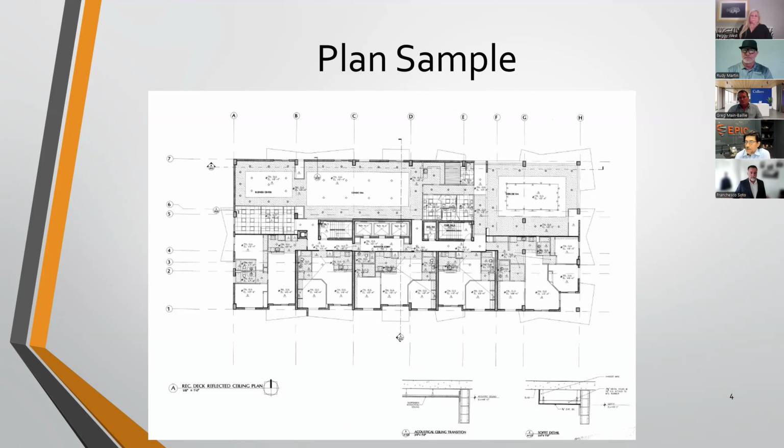And the one last thing to close that off is really going to be, I want to emphasize the whole bidding process and the importance of the bidding process. So, some easy, quick takeaways just from an owner's perspective as well: regardless of the project, if you are to go out to bid and you are getting numbers, and I'll just throw random numbers out here, but you have an expected project of $100,000, but you have numbers that are coming in at $25,000 up to $1 million, and you have a massive, massive spread if you were to throw that across the board, something's going on. That's not a successful bidding process, to put it lightly.